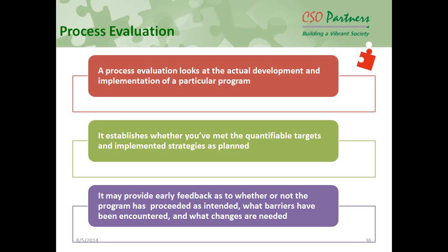Now, if you don't do the process evaluation and you go ahead with teachers training, then the next stage, after 3 years, we realize, oh my God, there was a big problem in methodology, or we should have done some kind of reinforcement of the inputs we have given to the teachers through some kind of refresher training and all these things. It might be too late to realize that and come back and rephrase the whole process. So that is why from day one, your process monitoring mechanism should be in place.